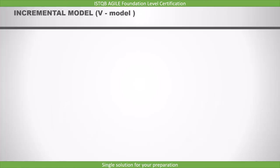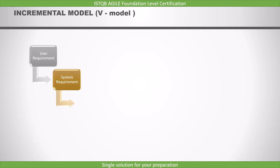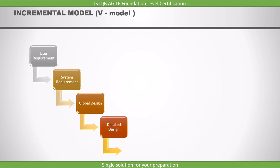Let's first see the linear model, sometimes called an incremental model. The V model is an example of the incremental model. In this model, first we have a user requirement which is provided by the customer. Then, from the user requirement, we write the system requirement. Once the system requirement is in place, we will write the global design and the detailed design. And once the design is done, we will start implementing the software.